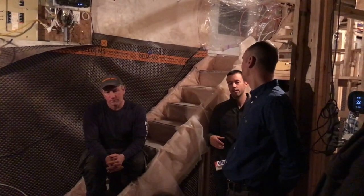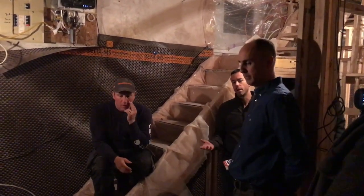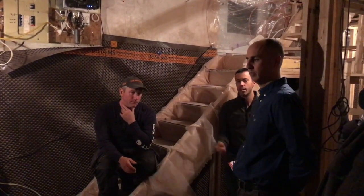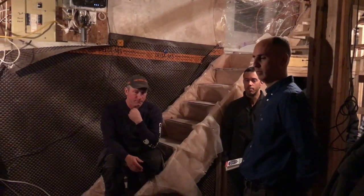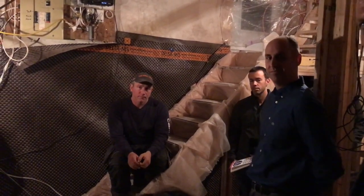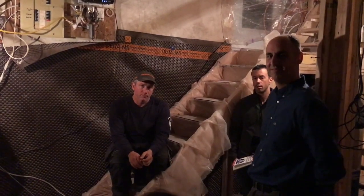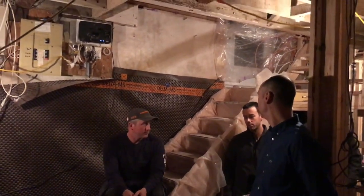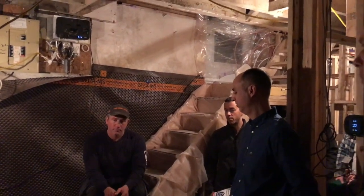So the only reason you're not doing a triplex right off the bat is to avoid the development fee? There's that, and potentially a committee of adjustment application. They would have to be checked before that, so to get a building permit right away and get shovels in the ground, so to speak, was the first order of business. Then the third unit may require other applications, and we planned for that during the first phase. The city's clearly onto the fact that people do this, but it's considered okay to do it in stages? There's no pushback? Yes, there are certain zoning regulations, and if you abide by them, it's fine.